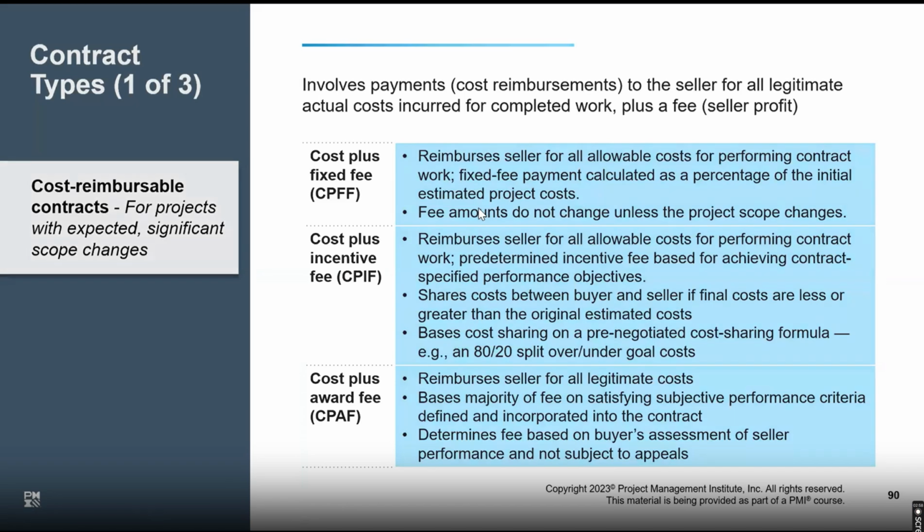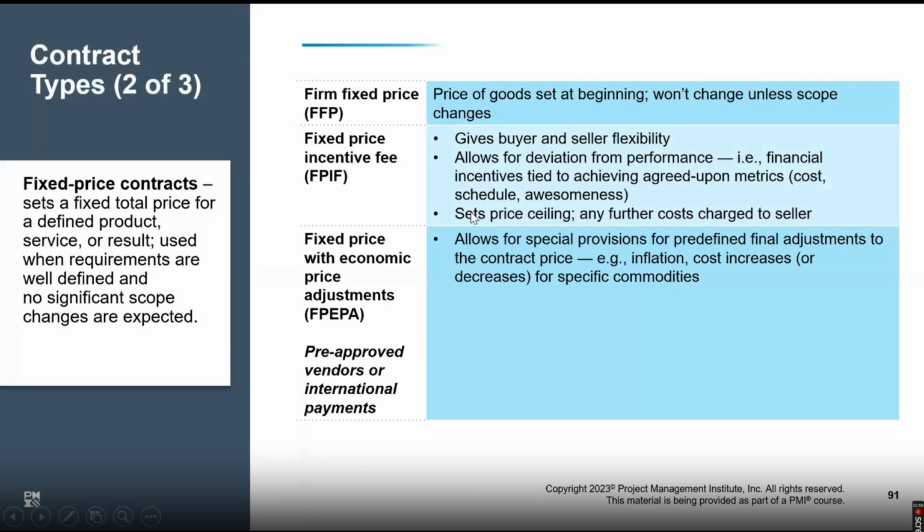Let's talk about the next one, which doesn't have that. This is better than the previous one. This is the lump sum one you're talking about. Here, the vendor is not paying anything from the pocket. No game of reimbursement. The vendor is supposed to get the job done. The responsibility to provide the material, pay the wages, like the salary of the laborers and all that, is not my job. I'll not pay anything from my pocket. My fee for getting this house, this construction done, is 50,000. Simple as that.